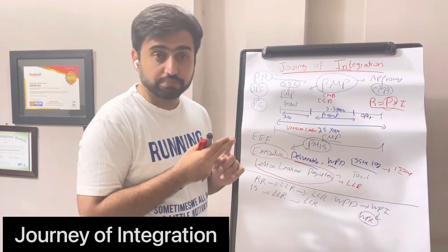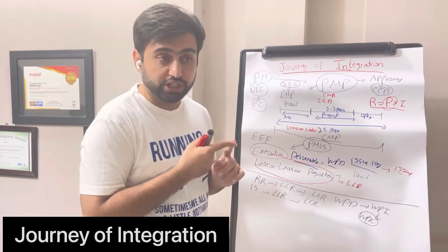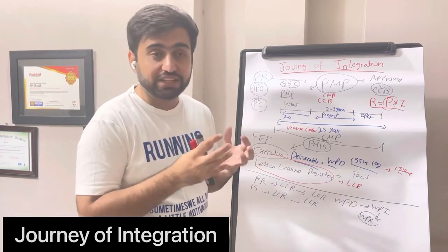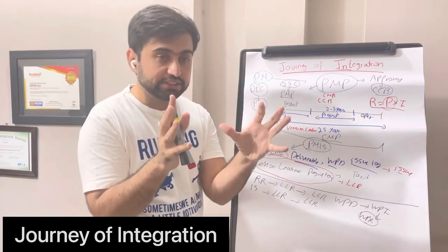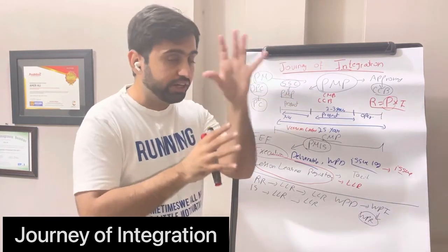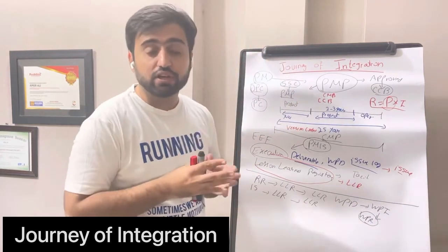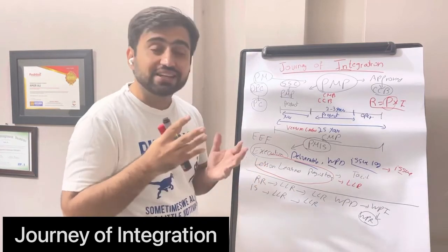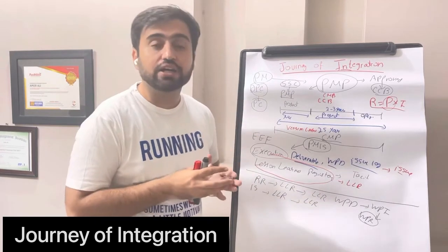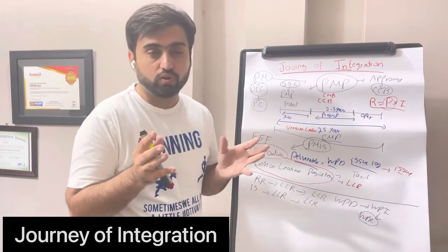Any change that is produced, we go with the change control board and changes are approved in integration. We integrate all the changes, like we check how one change will affect the other changes. We integrate everything. Then we have the configuration management plan that deals with changes to the product, like version control, artifacts. We discussed how we report all those things.